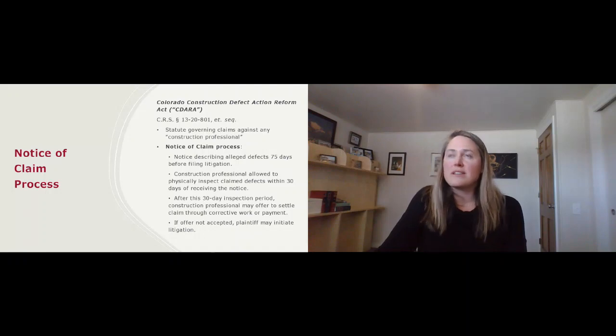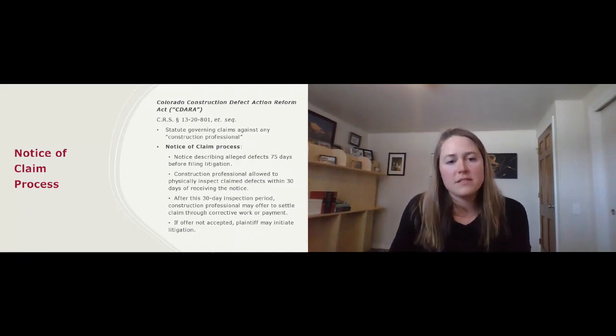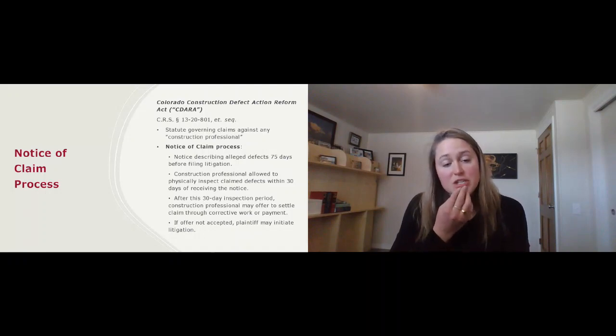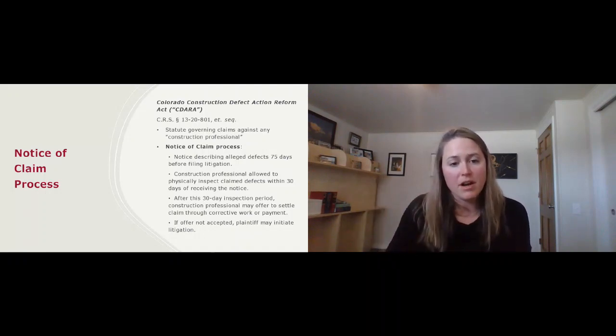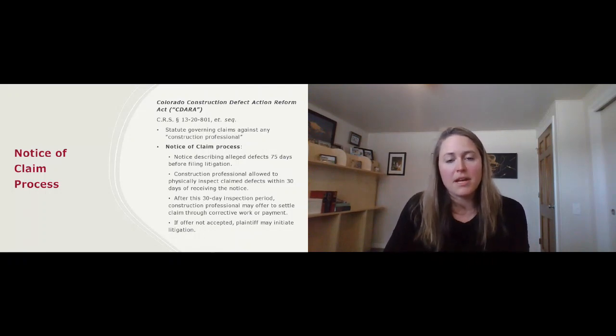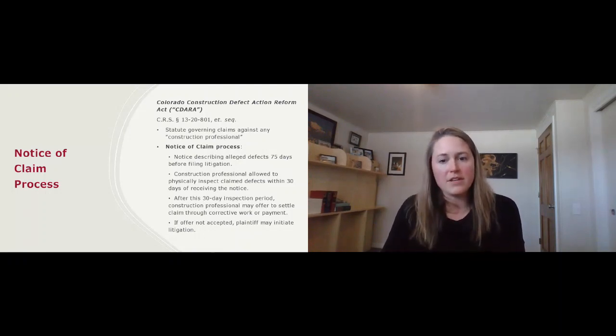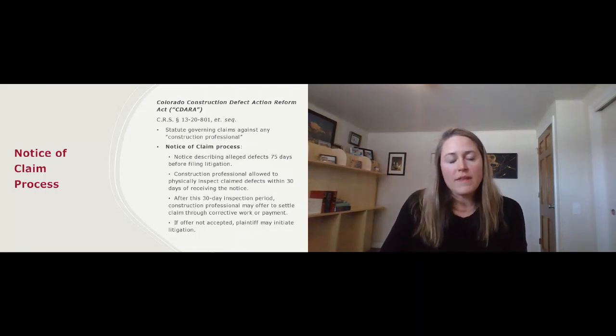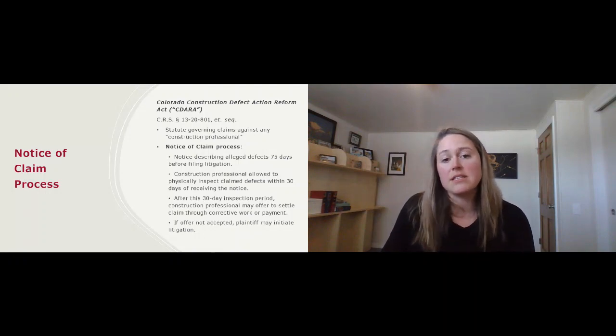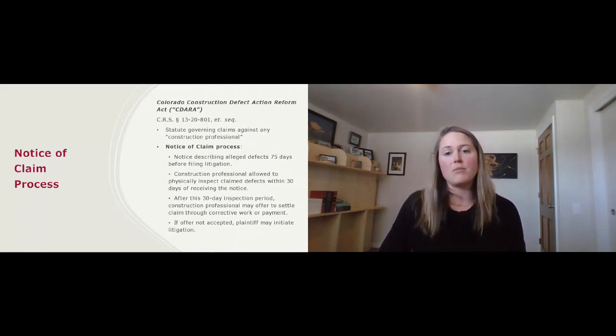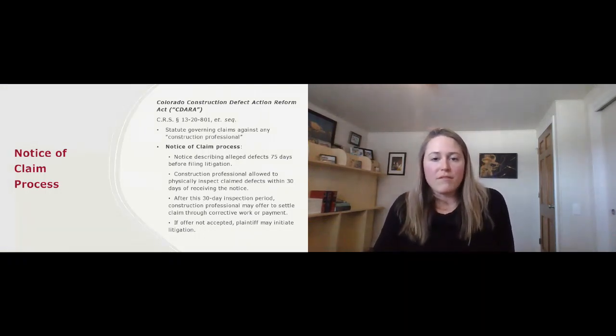It was back in 2003, I believe, initially, when this law was passed. And it was the legislature's response to the very high number of construction defect claims that were happening. And so they provide this notice of claim process in the statute in order to help resolve claims and disputes of construction defects before having to actually initiate full-fledged litigation. So in the notice of claim process, the statute requires a plaintiff, which is typically the property owner, the homeowner, or owner of the commercial property.